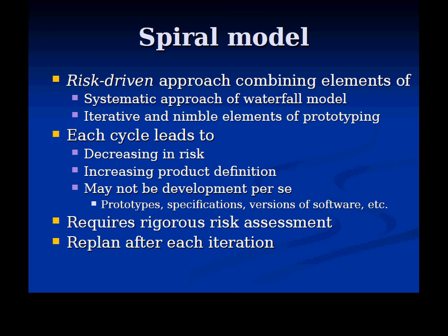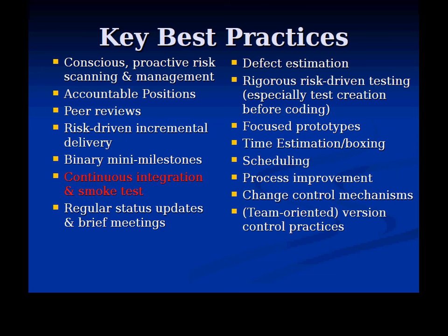If you're doing it over 6 months, you can just fool yourself. Over 6 months, the estimates that are involved are often highly unreliable. So I want to see those incremental milestones, okay?